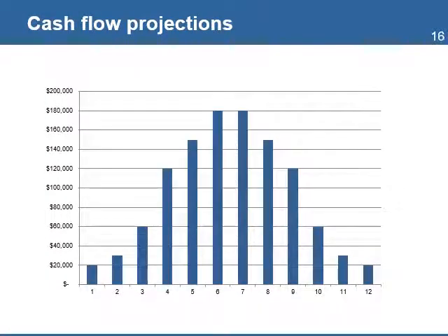The cash flow is an important tool for management of the project's budget. The projected cash flow is a forecast of the project expenditures during its life cycle. A cash flow projection not only helps the project manager, but also helps the organization have better control and management of its cash resources. The cash flow will also help control the project expenses as it makes progress. The planned cash flow will be compared with the actual expenses, and you will use it to evaluate any significant variances and take corrective actions.